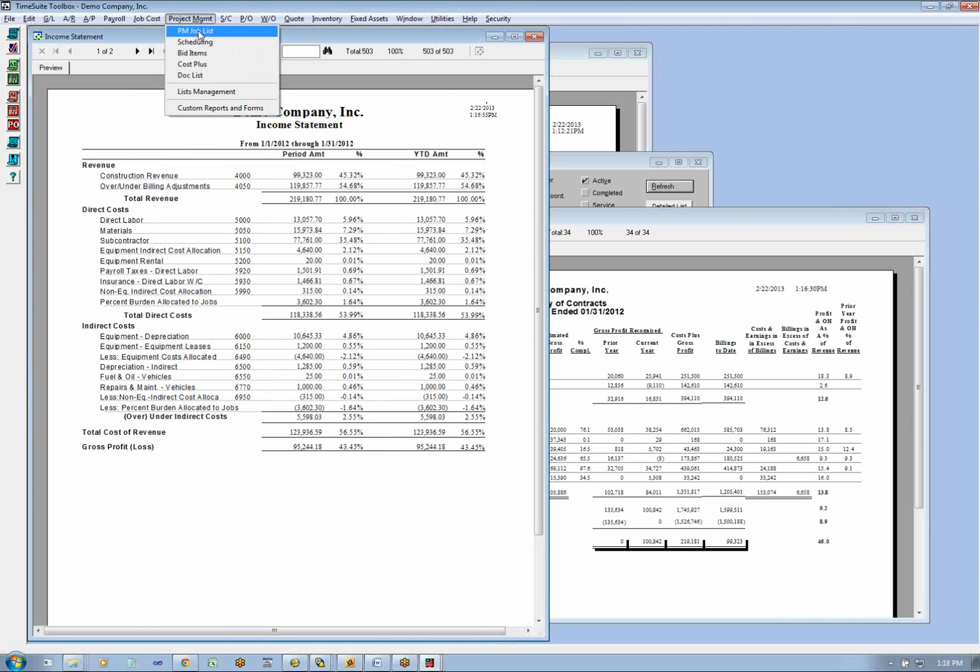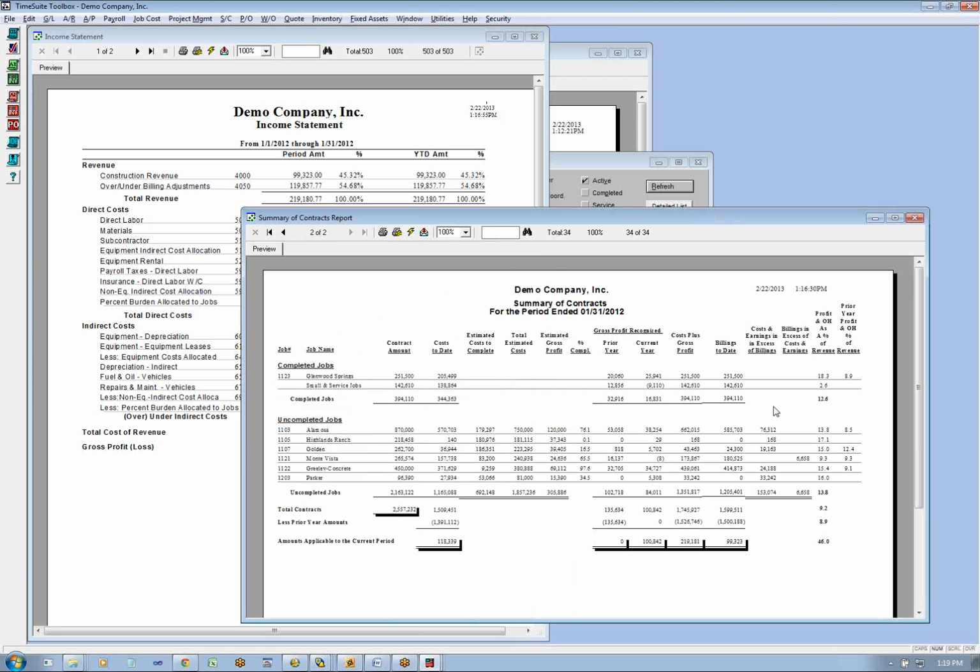By the way, we did automate this. You used to have to go into ISQL to perfectly burden your indirect costs. That's in the burden utility grid now, so that's a new feature. If you want to do that, just call one of us and we'll walk you through it. Getting this perfectly allocated at the end of the year is one thing I would do if I were you guys. You have to have your depreciation done, and your workman's comp liabilities and general liability insurance accruals need to be done before you do that, because they usually affect those sections.